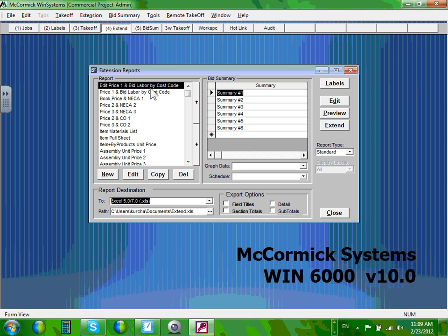And now you'll see, I am in Minneapolis, and I'm going to make my labor. I want you guys to do the following labor, just for the heck of it. We're going to use book price and NECA 1. NECA 1, 2, 3. Everybody knows the NECAs. The higher the number in the NECA is what? The more expensive the labor is. We're going to be using NECA 1 just for this project.